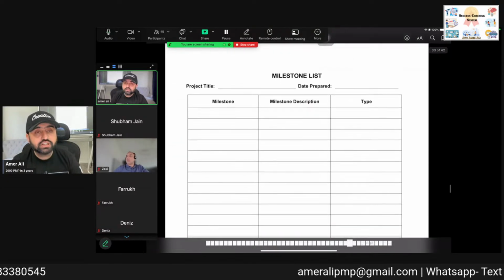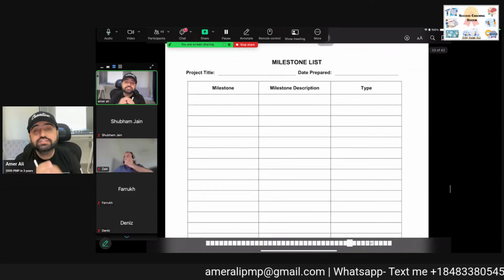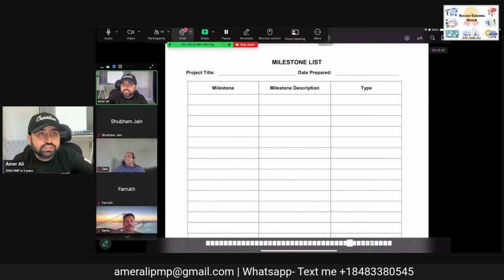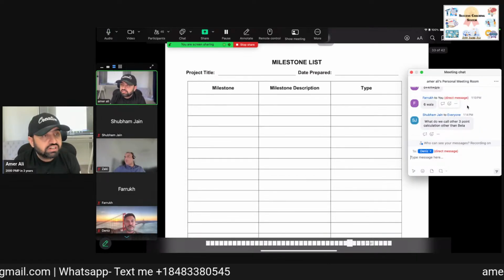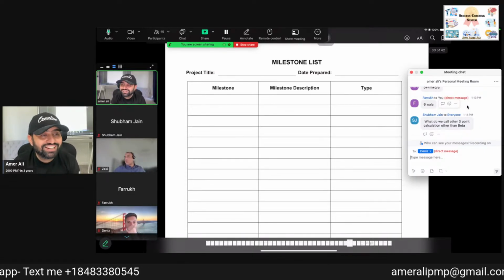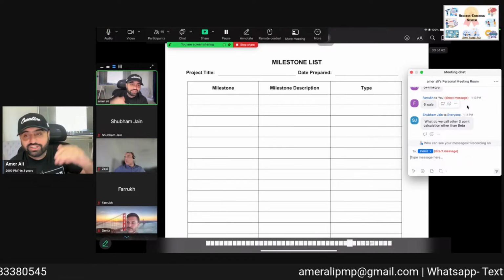Then the milestone list. What's a milestone? A milestone is a significant point in the project. This list is sometimes the most important list in the project because the payment is linked to it. If you do this, you get that.